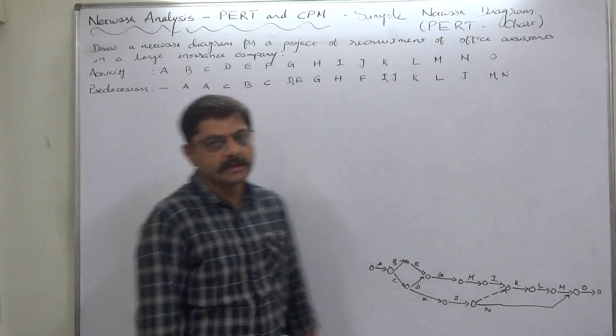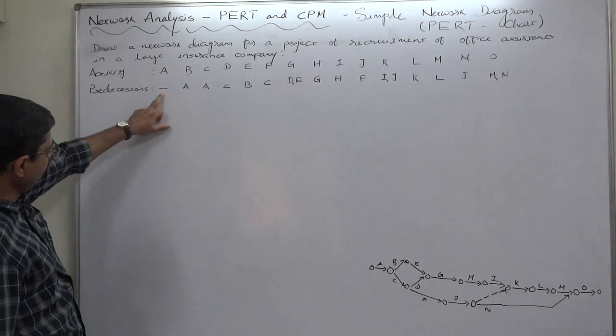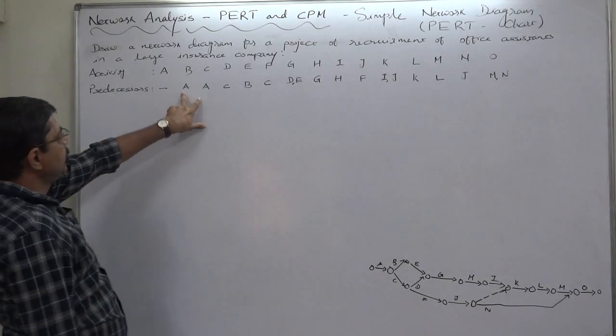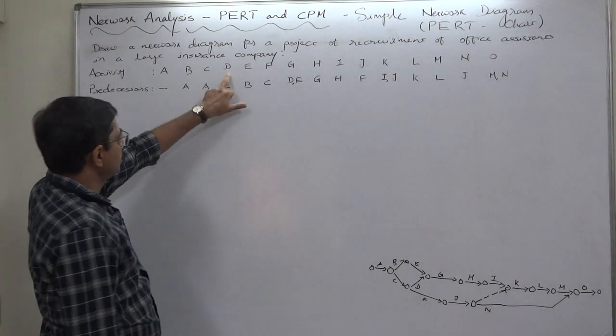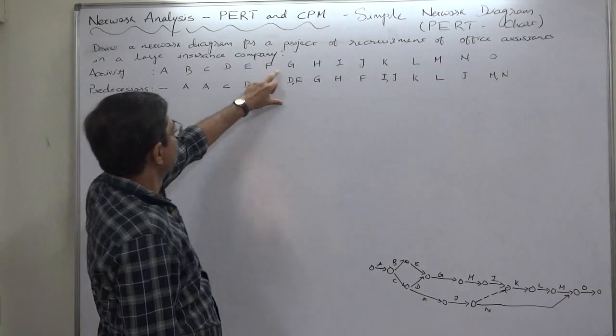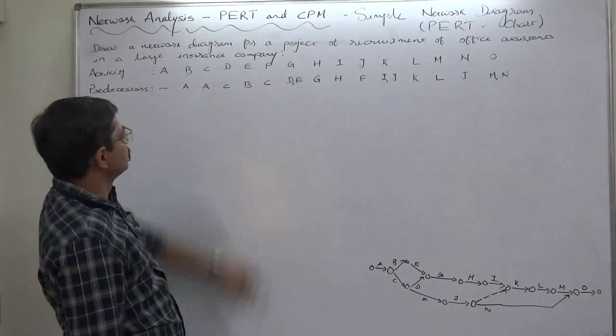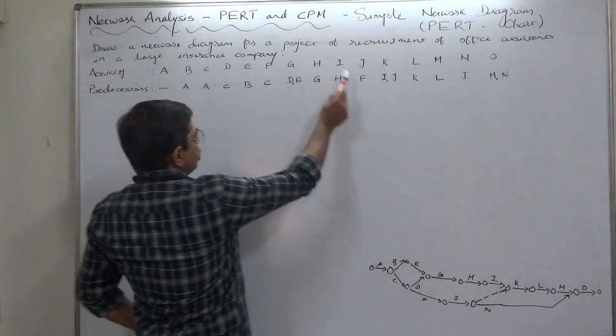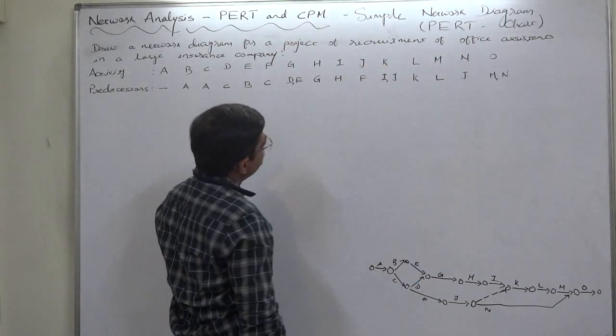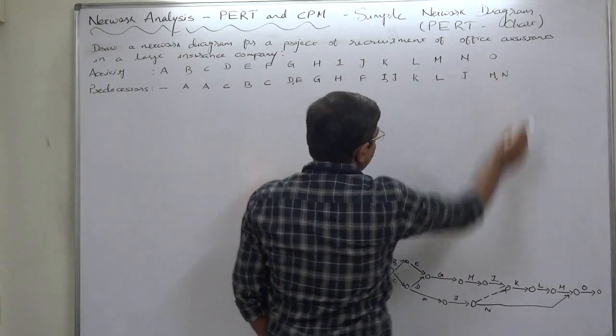There are many activities because the entire procedure of recruitment and selection is quite lengthy. A to O are the activities. A has no predecessor, that means A is the initial activity. A becomes predecessor of B and C. C becomes predecessor of D. B becomes predecessor of E. C is again predecessor of F. D and E are predecessors of G. G is predecessor of H. H is predecessor of I. F is predecessor of J. I and J both are predecessors of K. K is predecessor of L. L of M. J of N. And M and N of O.